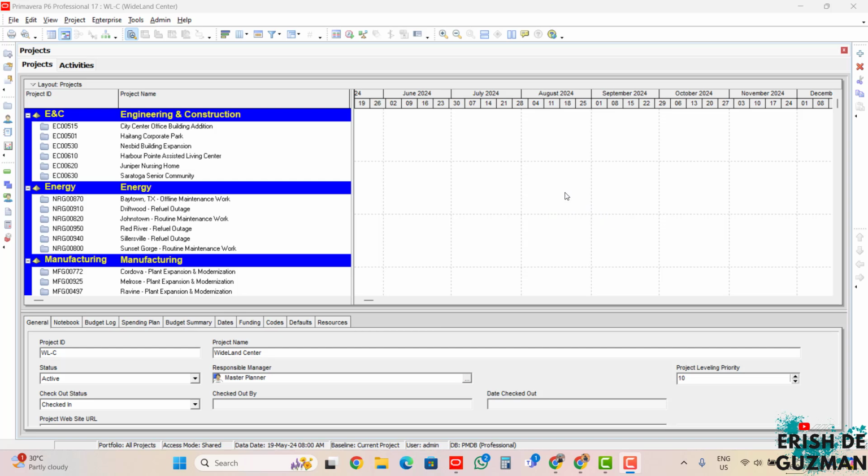We also have what we call the XML. This Primavera file format was first introduced with version 6.0. This is used to import data from the project manager module. Next, we have the PCF. The function of PCF is to exchange global changes between Primavera databases.